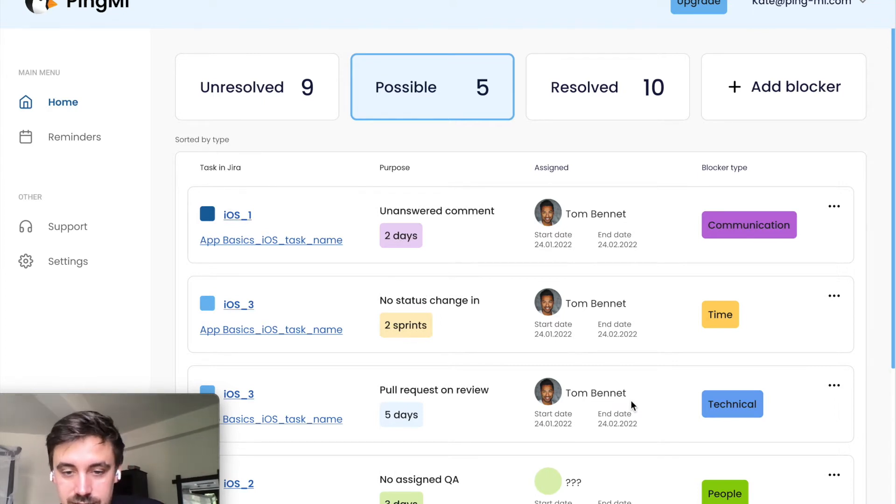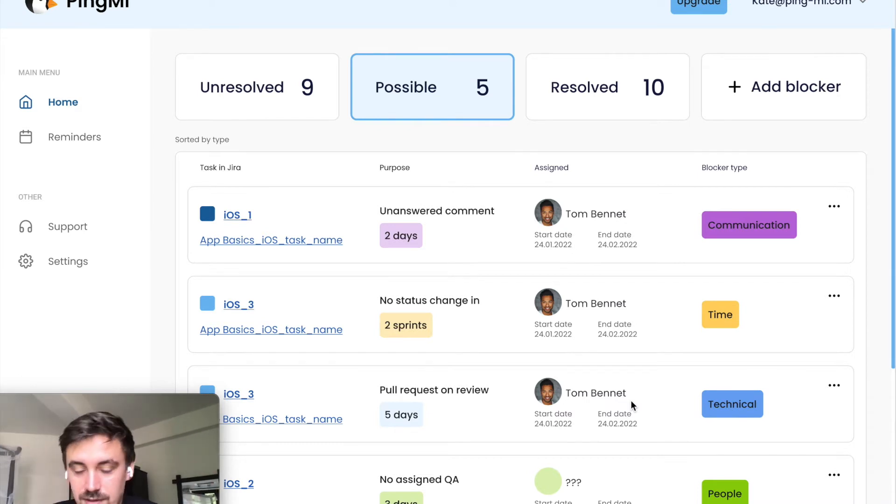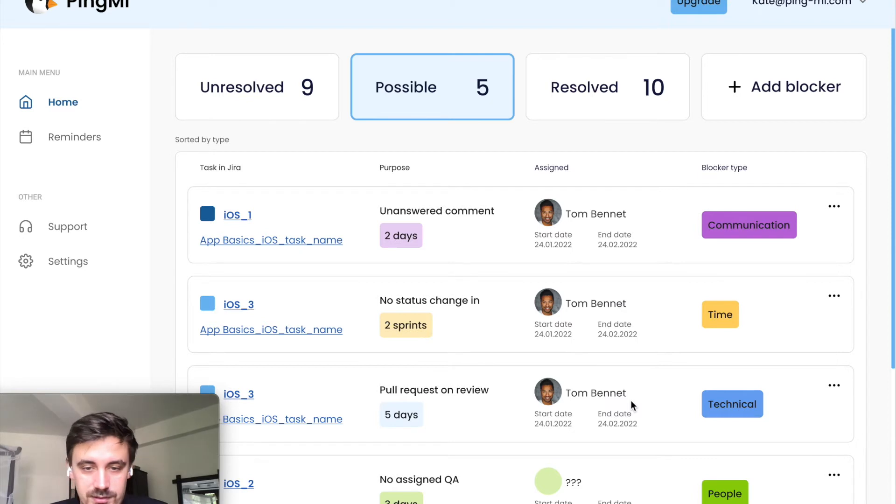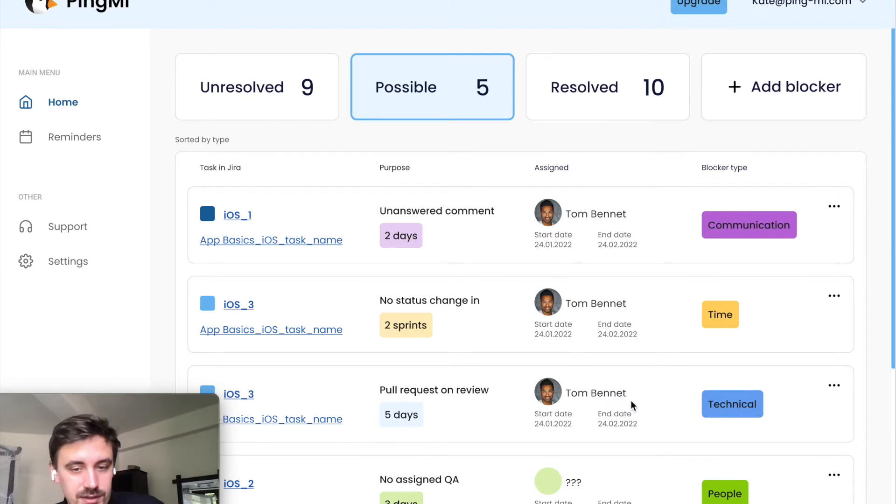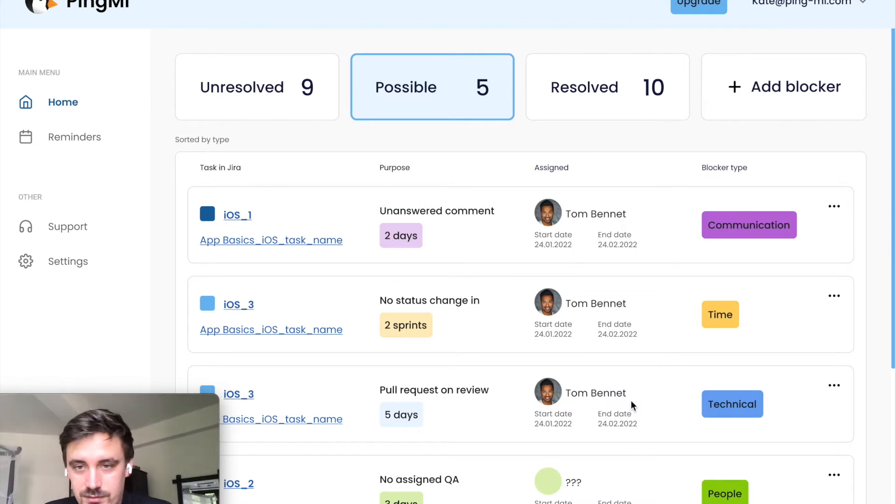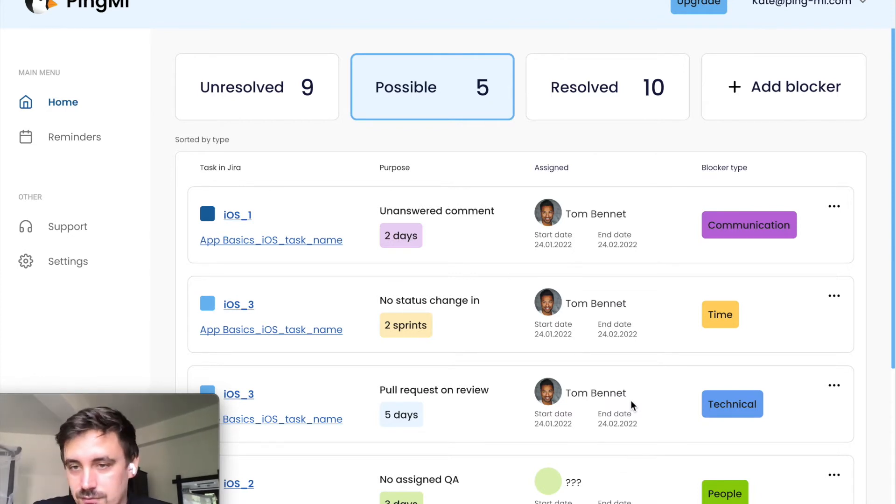And the last one is about people. It's maybe someone not assigned to ticket at all or maybe a ticket in QA stage and no assigned QA in that ticket. We will remind you about it and we will show it here.